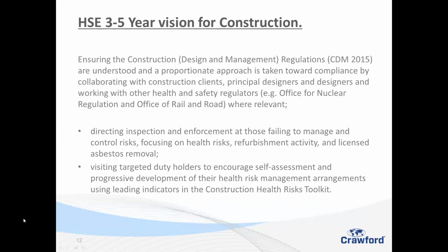Okay, coming back to PDs again. Someone here has asked, do you need a principal designer appointed where it is non-notifiable work? Yeah, as I said in the actual presentation, if there's more than one contractor, we need to get a principal designer appointed, and that person must have knowledge, skills, experience, and qualifications if they've got them. That's all the more helpful. And as I said, there are courses run by the Association of Project Safety that will get you there. Very interesting two-day course with an exam as well, and the ability to join the APS afterwards.